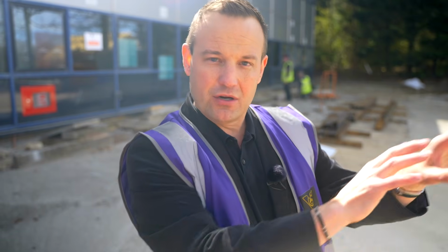Once you've got a site under offer, you can really dive into due diligence, start spending money on some of the key consultants, take away the highest levels of risk first. First thing is getting your GDV, your gross development value, right. Mess that up, 5 flats less, that could be all your profit at the end of the site. So that's when your layouts come in: give it to the professional to draw up what you think it should look like. And if you don't know how to do that, you're going to leave the creative side to the architect. That's okay.